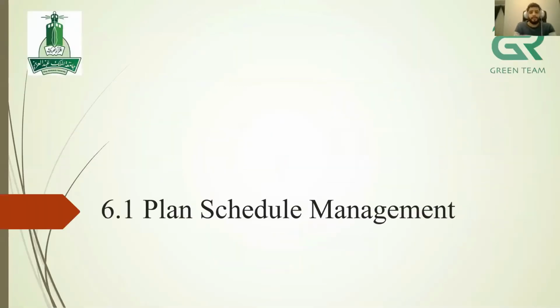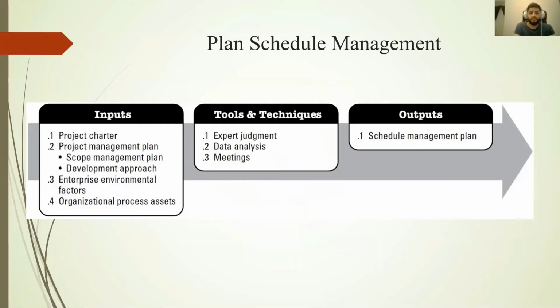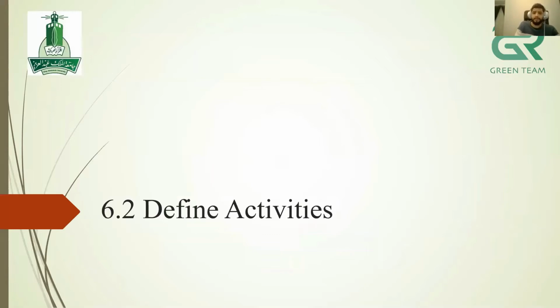Plan schedule management. The inputs are the project charter, project management plan, EEF and OPA. The tools and techniques are expert judgment, data analysis, and meetings. The output is the schedule management plan. Define activities.